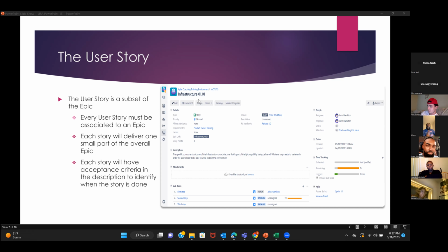But in the meantime, you want to make sure you talk to your PM. One thing that we don't want to do is keep bringing issues into the sprint, right? There's a reason why we are doing sprints and we are doing agile. We already spent some time to plan, and even though we've planned, we don't want you still adding more stuff into it.